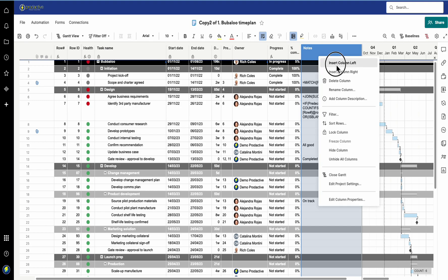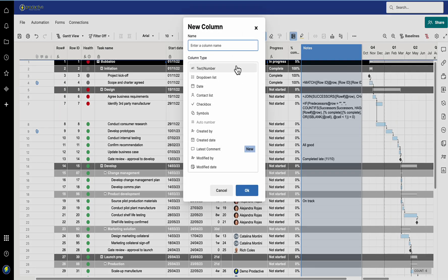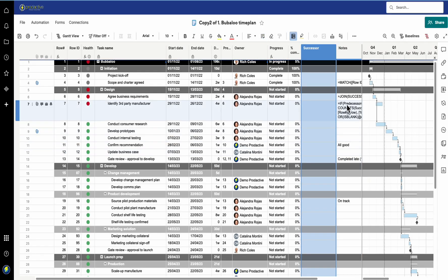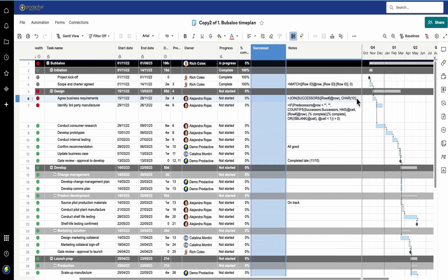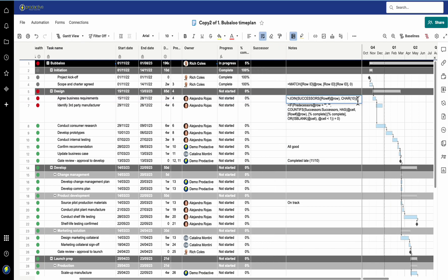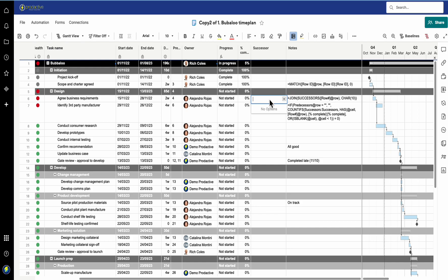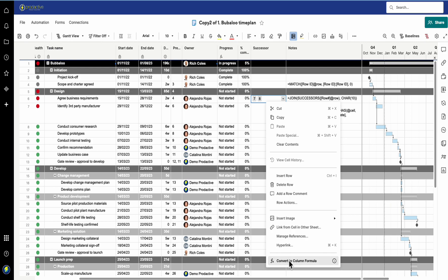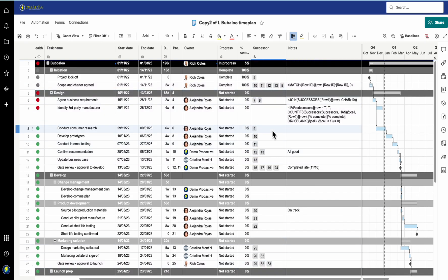Once you've got your row number, that's needed for the successor. The next piece is you're going to add in a column called "successor". This needs to be a drop-down list and it needs to allow multiple values per cell, so when it's looking it knows to look at each number independently. I've added that column in, and here's the formula: join successors at row with character 10. Character 10 is a delimiter that creates a carriage return which separates these from each other. I'll paste this in, press enter, and you can see they've been added in. Now convert to column formula and they're all added up and down the sheet.